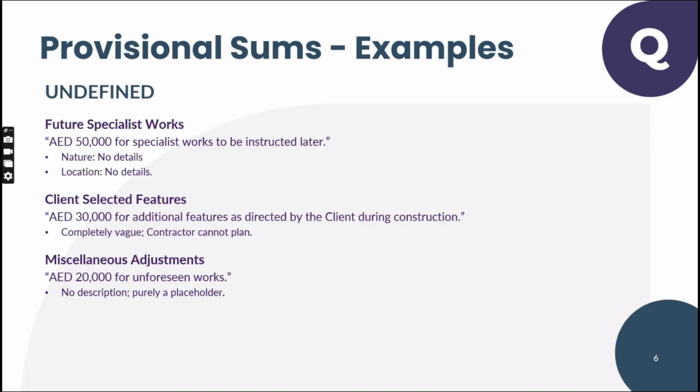Again, there will be contingency for future variations and future changes for sure, but specifically for this kind of item, they will put a contingency. That purely depends on the type of design, the number of undefined items, and the number of potential design changes. It varies from design to design, so based on that they will put a contingency element there.